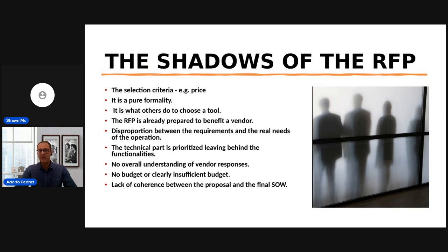In other situations, the problem that we see is that the RFP has already been prepared, or the questions have already been prepared to benefit one of the vendors. So, for instance, if we know that we want to work with a specific vendor, and we know that vendor has got forecasting tools for chat, there will be questions about that, because in that way the company will be able to answer that, and obviously it will check those firms as positive for them. So some of them are clearly designed for one specific provider.